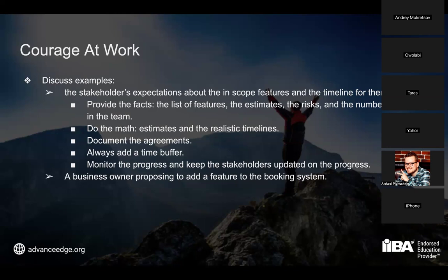And also a good example from my personal practice is that when you give some ETAs, estimated times of arrival, when you tell the due dates for certain tasks, always add a time buffer, right? For example, you understand that you need 8 hours to complete something. Do not say it will be ready tomorrow. Say it will be ready the day after tomorrow, because first of all, unexpected difficulties can arise and you always need that time buffer.